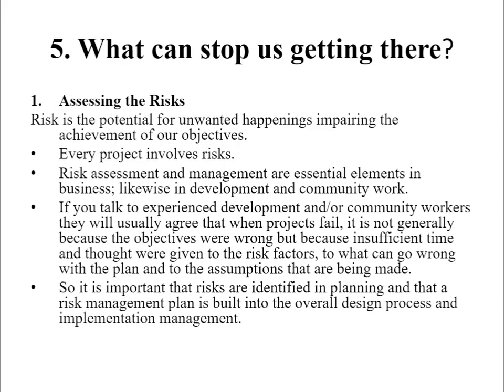If you talk to experienced development or community workers, they will usually agree that when projects fail, it is not generally because the objectives were wrong, but because insufficient time and thought were given to the risk factors, to what can go wrong with the plan, and to what are the assumptions that are being made. So it is important that risks are identified in planning and that a risk management plan is built into the overall design process and implementation management.